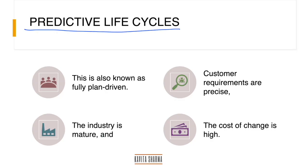Let's talk about predictive life cycle. It is also called fully plan-driven. When should I use it? This is a life cycle where you've gone through this particular process so many times. Think about construction — you construct a building: first floor, second floor, third floor, then wiring, plumbing, then finishing, and then you hand it over. You do not go back and redesign after the second floor. A predictive life cycle means we plan, do, check, act, and deliver.